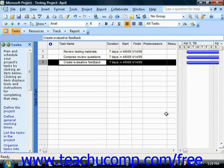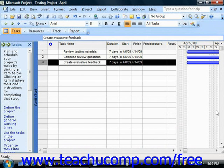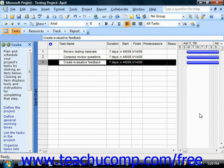Now when you set the duration of a task, remember that Microsoft Project will schedule the task as soon as possible, but only will schedule for time during available work hours that you allowed for the project when you defined it.